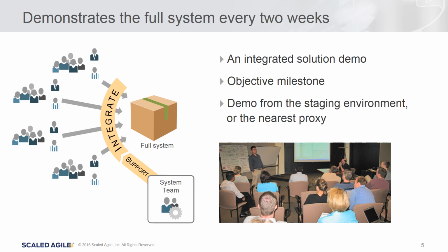It's an integrated solution demo. It's every aspect of the solution that you need in order to understand the actual progress of the value created for its consumer. It's the one and only truly objective milestone. If the team can't build the system or show new functionality in a couple of weeks, something's probably wrong with their infrastructure or team configuration. Maybe they don't have the people they need. Maybe it's not a fully cross-functional team yet.